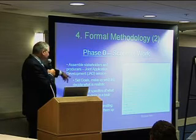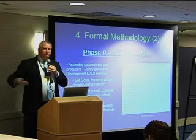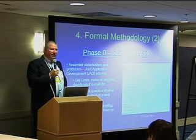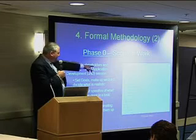And so you set your goals. One of the common ways of addressing that is when people have goals, they are usually virtually limitless. I want everything. And it's actually not a bad exercise to get together and say, okay, well, you want to do this thing. Tell me everything conceivably that you might want to do. So that's really good as an exercise for figuring out the scope of all the things that you may want to do in some endeavor. Then what you do is you go back through it again and say, okay, well, what can we realistically achieve, given what we know our constraints are in terms of money and resources and time, okay? And this is kind of an interesting method.